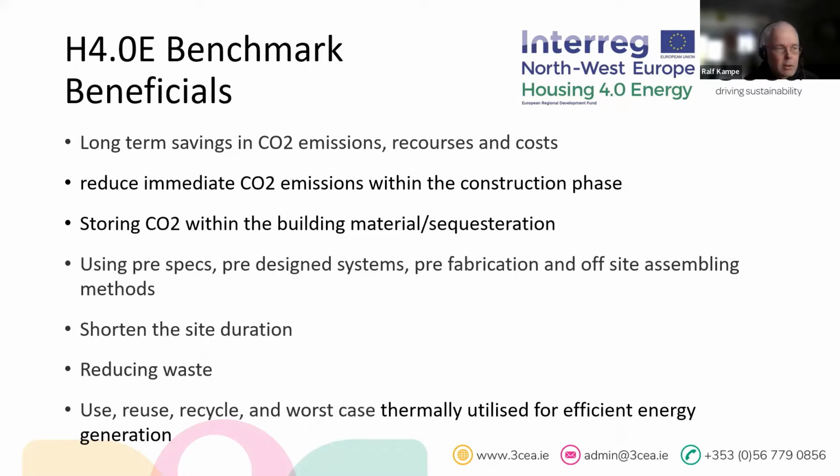And by using pre-specified, pre-designed systems, and prefabrication and offsite assembly methods, which shorten the site duration, we get much more precise products and reduce waste.